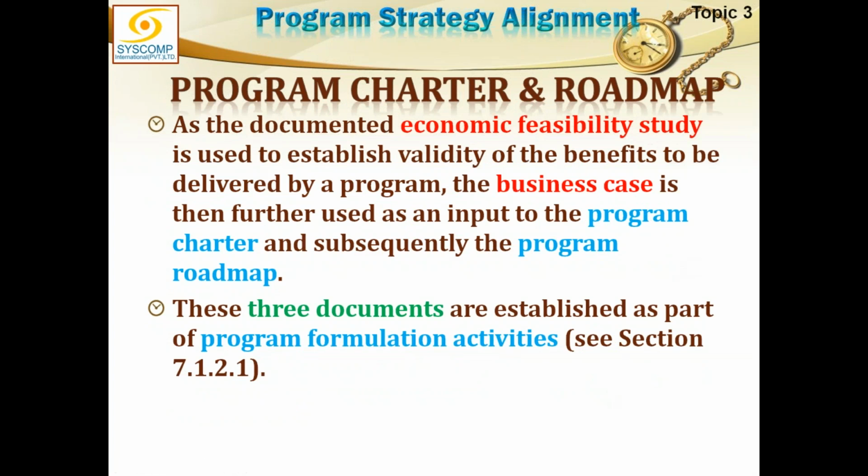Program charter and roadmap. As a documented economic feasibility study used to establish validity of the benefits to be delivered by a program, the business case is then further used as an input to the program charter and subsequently to the program roadmap. These three documents are established as part of program formulation activities.